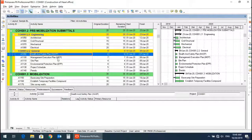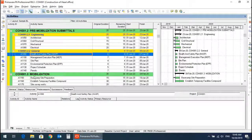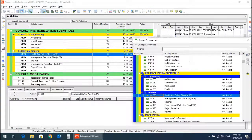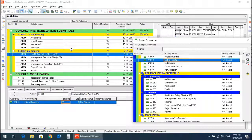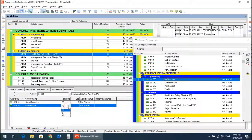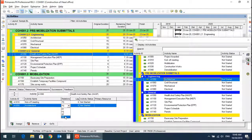Now let's assign predecessors and successors to the general categories — the pre-mobilization submittals. The health and safety plan should have a predecessor of kickoff meeting. It can also have a predecessor of architectural drawings, as these can start on the same date, so start-to-start is the relationship.